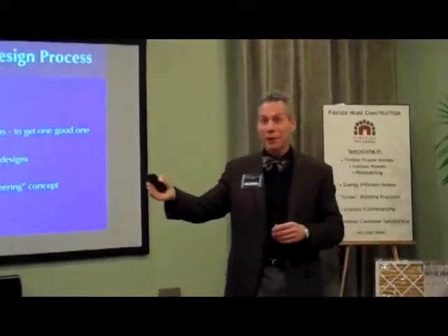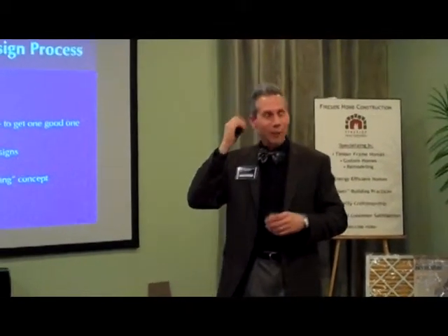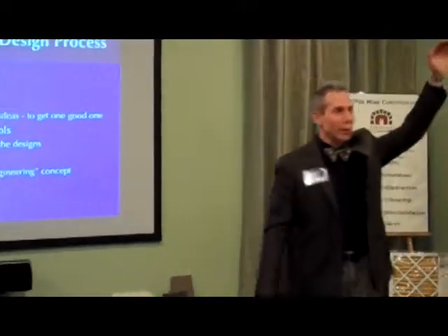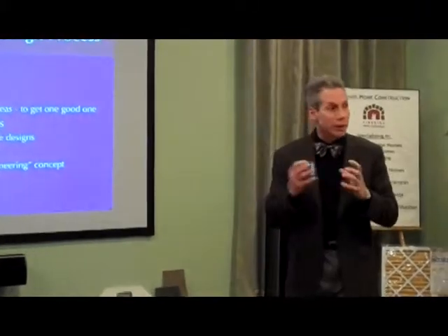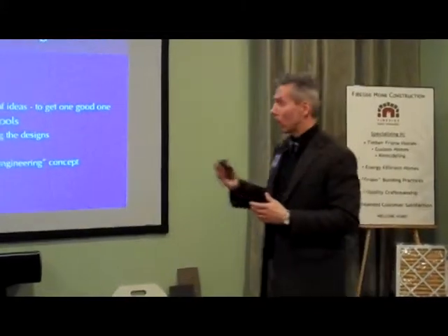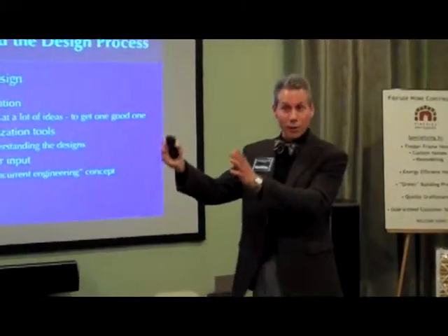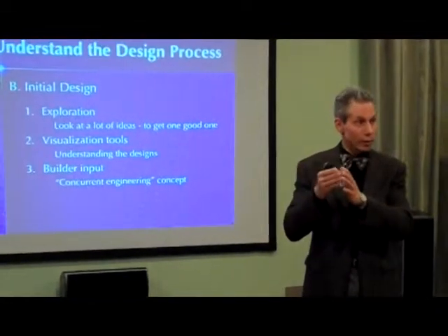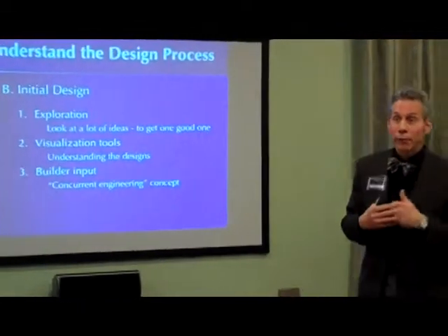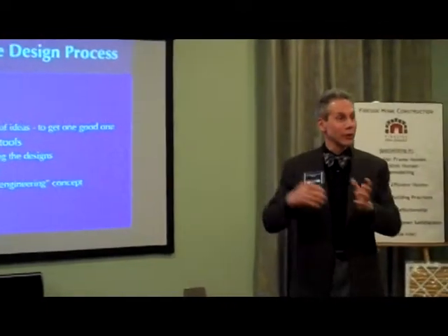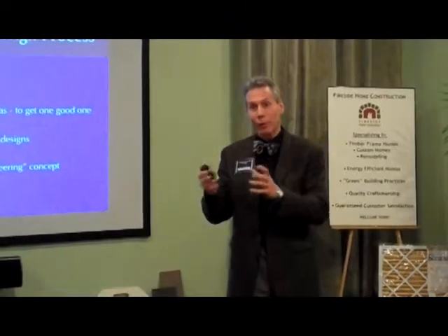That's when you hear these cocktail party stories about, yeah, we did this design, we loved it, and it ended up being twice what we could afford. Well, that's because they didn't have a concurrent engineering or a team approach from the very start. So we always, and if people want to talk to 3 builders, I say that's fine. Let's talk to 3 builders at the start, then pick somebody and have them join us. So we work together as a team. We've worked with people in both fashions, the traditional design bid and design build. And I can say that most of the time the design build process leads to a superior process, product, and happy client at the end of the day.